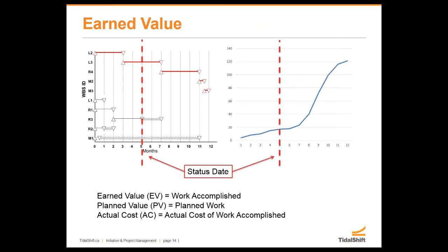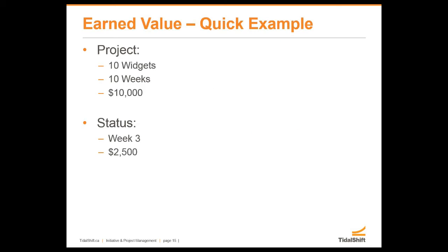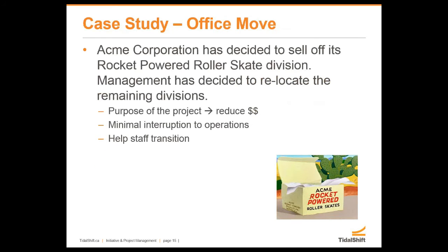The S-curve comes right out of your Gantt chart because that's where you get your schedule from. You put those dollars per task in your S-curve. It's just the mechanics of creating it at this point. So assuming you've done a good Gantt chart and you've costed per activity, your S-curve is already there. It's just a question of representing the data. Now that I've done that, you have everything you need to do your earned value. You just have to get your reports as to what your accomplishments are.